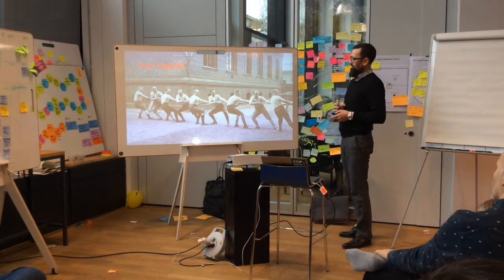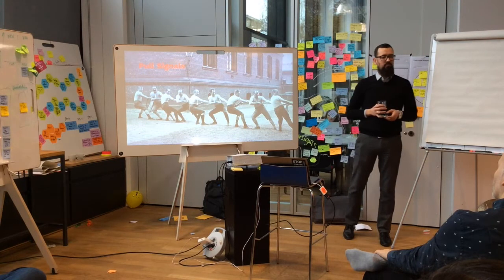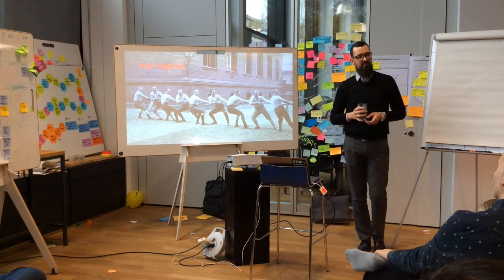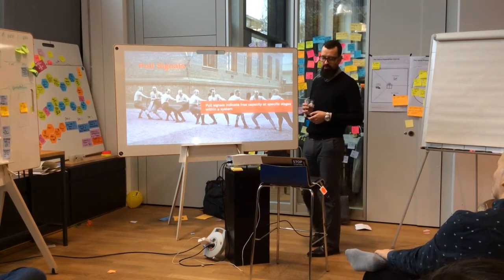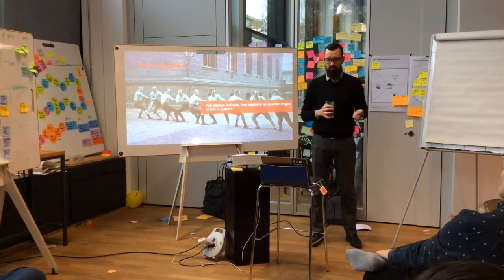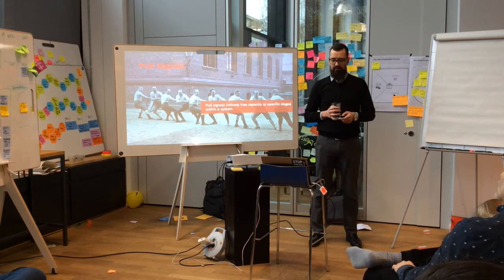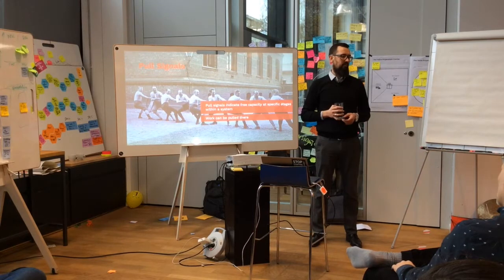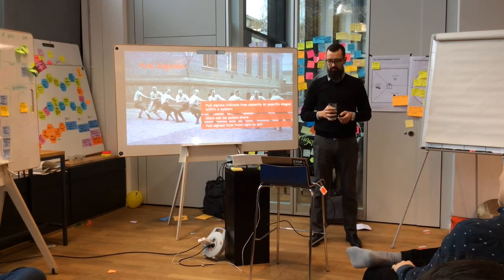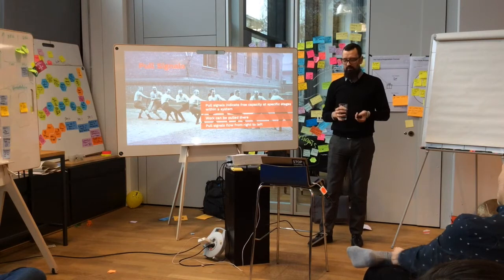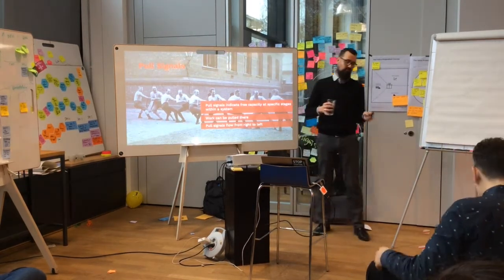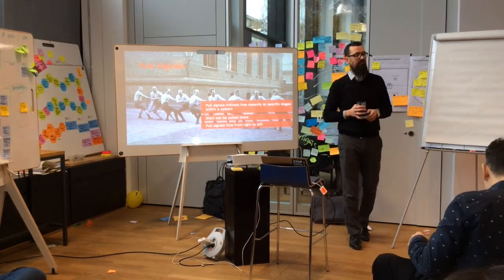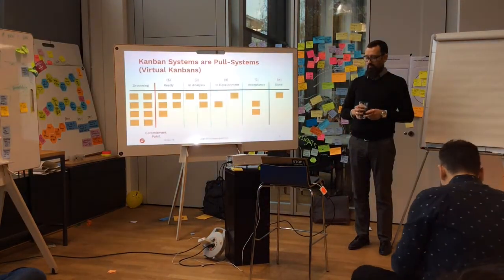So what are pull systems and pull signals? We need those pull signals in order to implement a Kanban system. Pull signals really indicate at which point in your process or workflow there is capacity. If you know that, you can pull work into that workflow step. The pull signal propagates from right to left, and work usually flows - at least in the Western world - from left to right.